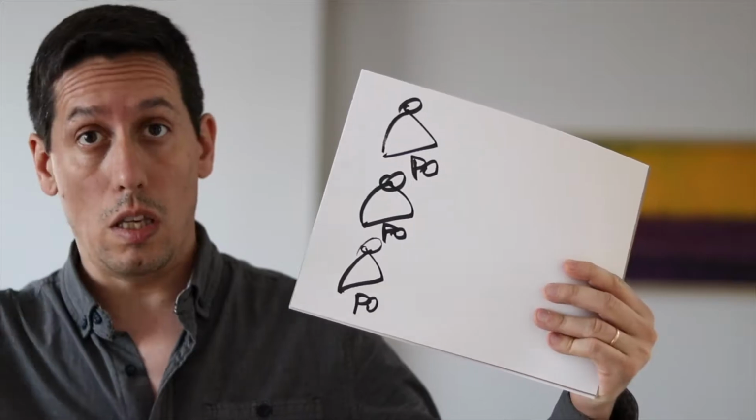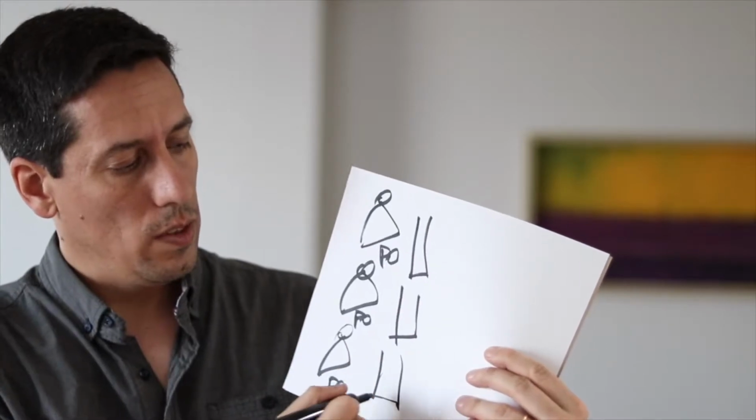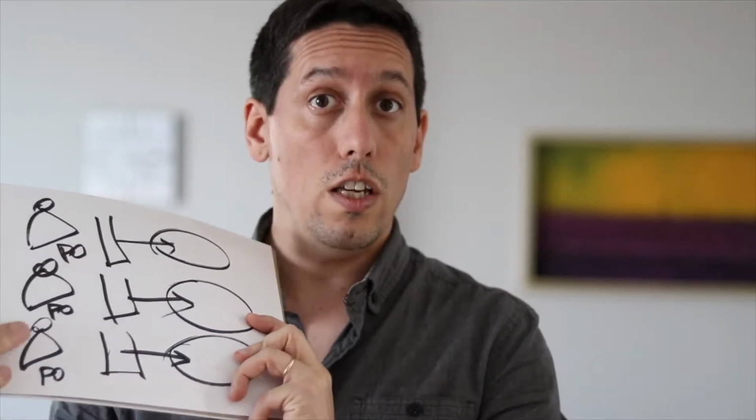Let's find it out. There's a big tendency when we talk about scaling to replicate that model, that pattern, in different teams. For example, having 3 product owners that work in parallel of each other, each with a product backlog. There's one team that works on items from each of the backlogs. So we have 3 different teams working with 3 different product backlogs, working with 3 different product owners. We can say this is a consequence of the amount of products and the granularity of the definitions of the products we have in our organization.